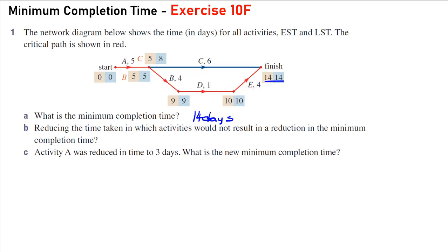And it's called a critical path because we need to start everything straight away. And you can see here the EST and the LST along the critical path for each of these activities are the same number. There's no time in between. We have to start them immediately. So it's this project here, project C, that we can reduce, but it won't reduce the minimum time.